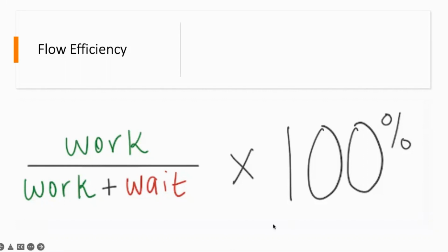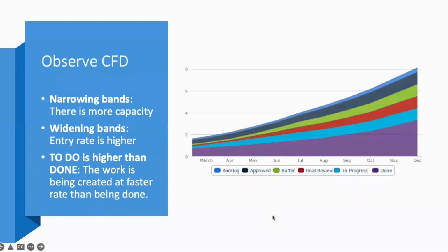So these are the two metrics that help you look at the patterns of the work, the patterns of the flow, and accordingly you can optimize your flow of work by removing blockers, by altering the WIP limit, and by looking at whether you missed any of the workflow stages while you were visualizing your work.